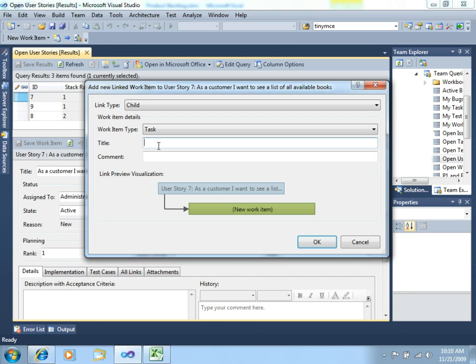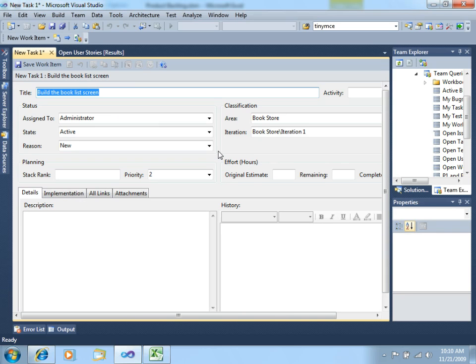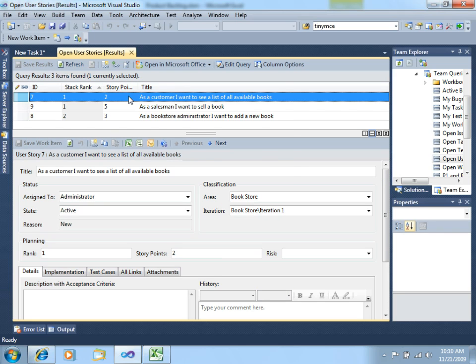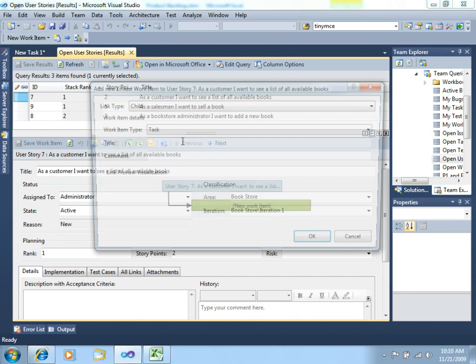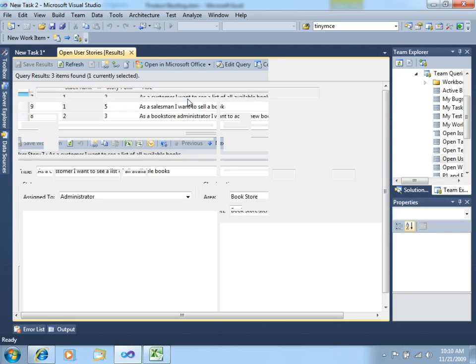And, let's say that, in order to do this, we will have to build the Book List Screen, which will be our first task. And, let's go back and add another one. Let's say that we will have to test the Book List Screen. The Book List Screen will be a screen where we will see the list of all these books. Let's hit OK.